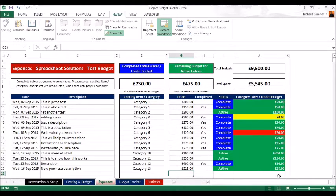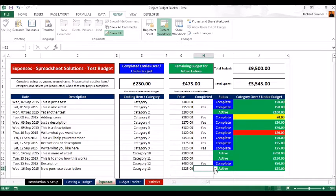It will then ask you: is this category complete? If you still need to make purchases against category 13, leave it blank. If it was a single item and it's done, you can click 'yes' and it'll mark it completed, adjusting the figures accordingly. All your completed entries show whether you're over or under budget — at the moment we're 255 pounds under budget, meaning we've still got 255 pounds in the bank.